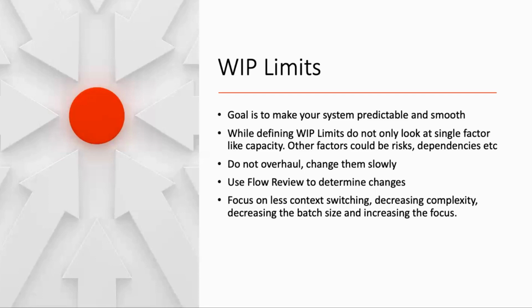So will there be a discovery phase in that? What would be the technical challenges that you might face? What would be the other regulatory challenges, like legal approval, security approval, that you might have to get, and accordingly alter your delivery? So you have to look at all these factors before you actually set your WIP limits.